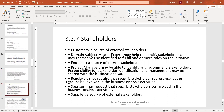Stakeholders involved in this engagement approach include customers as a source of external stakeholders, domain subject matter experts who help identify stakeholders, end users as internal stakeholders, the project manager who may share stakeholder identification and management with the business analyst, regulators who may require specific stakeholder representatives, sponsors who may request specific stakeholders to be involved, and suppliers as external stakeholders.